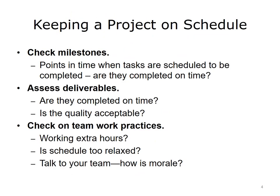This slide presents a number of activities to help you keep a project on schedule. First, check milestones. When you planned your schedule, you should have inserted milestones — points in time by which specific tasks are to be completed. If your milestones are being met, your schedule should be well on track.